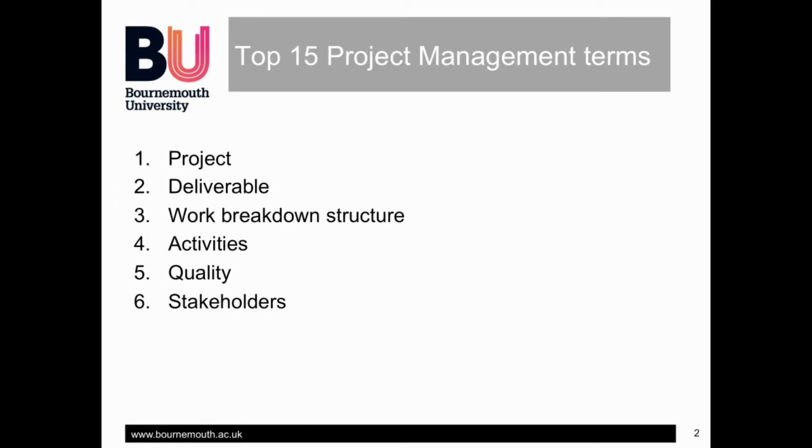For the party, we talked about the main components being the venue, guests, entertainment, food and drink. The sum of all the parts of a project are called its scope. When you're working on a project, it is essential to ensure the stakeholders are aware of the scope of the project, as this avoids confusion later. It's also useful to define what is not in scope so that there are no wrong assumptions made.